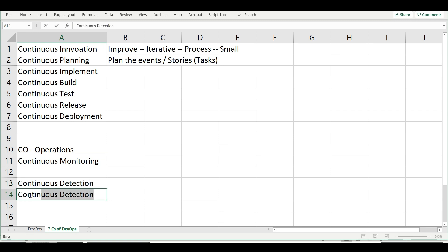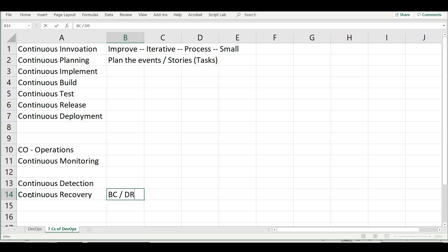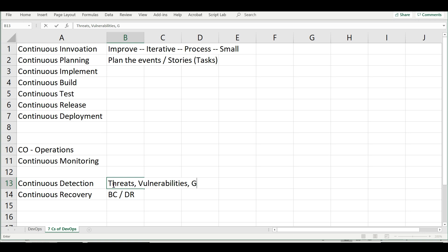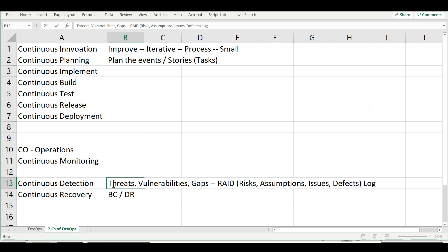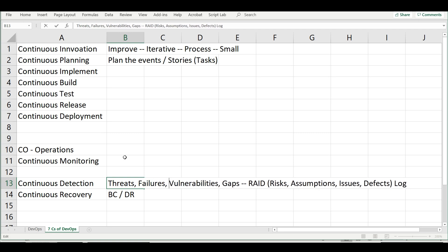There is also continuous detection — a newer term after security was included in everything and disaster recovery got more focus. This covers business continuity and disaster recovery, mainly identifying potential threats, vulnerabilities, and gaps. We maintain something called a RAID log — capturing Risks, Assumptions, Issues, and Defects in the environment — in a risk register or issues register, a single log document where all potential threats, failures, and gaps are captured so we can come up with mitigation.